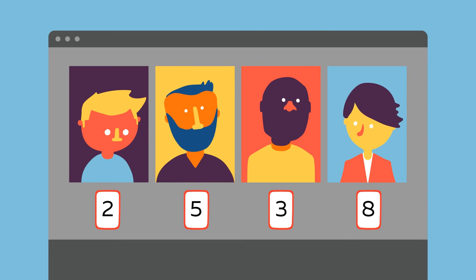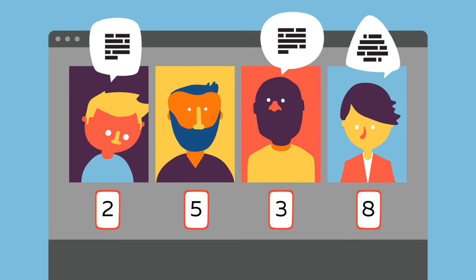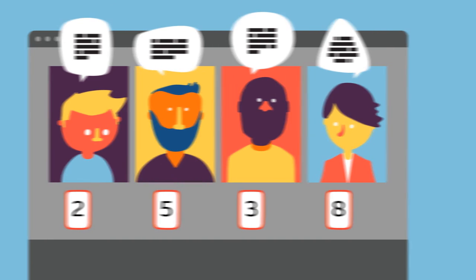The team can then discuss their estimates, particularly the outliers, and come up with the best estimate for each task.